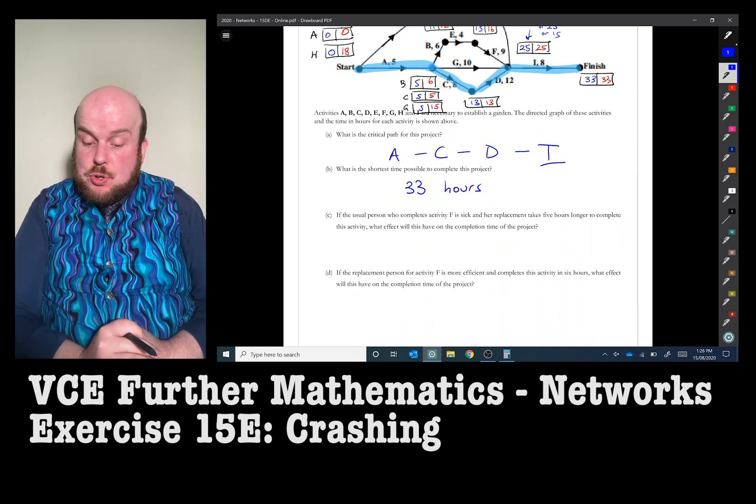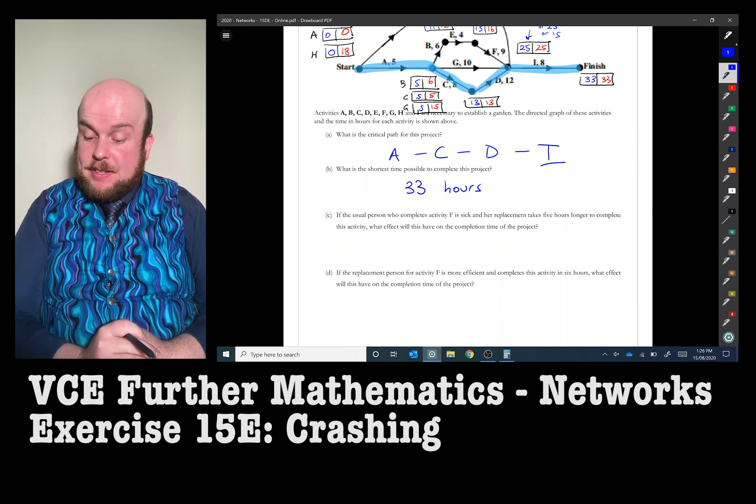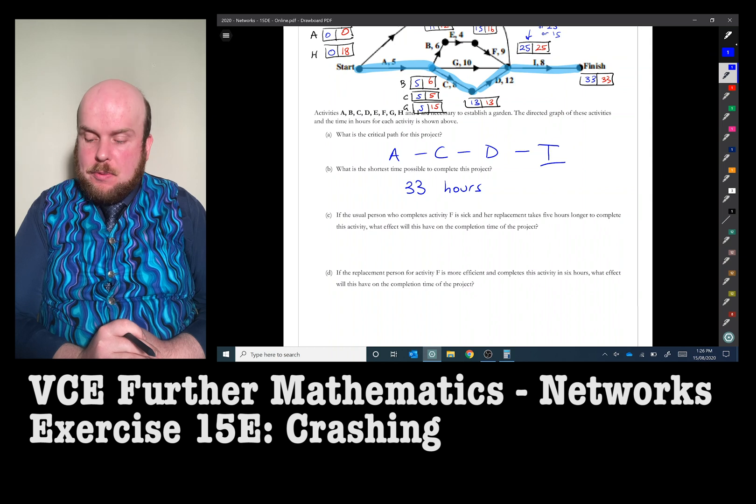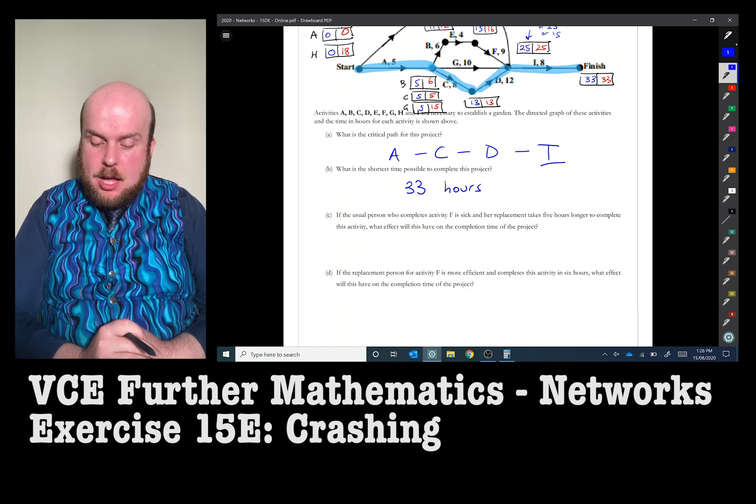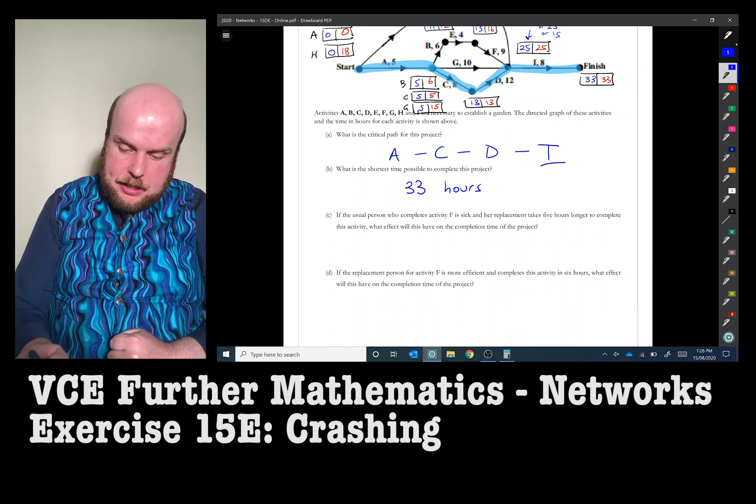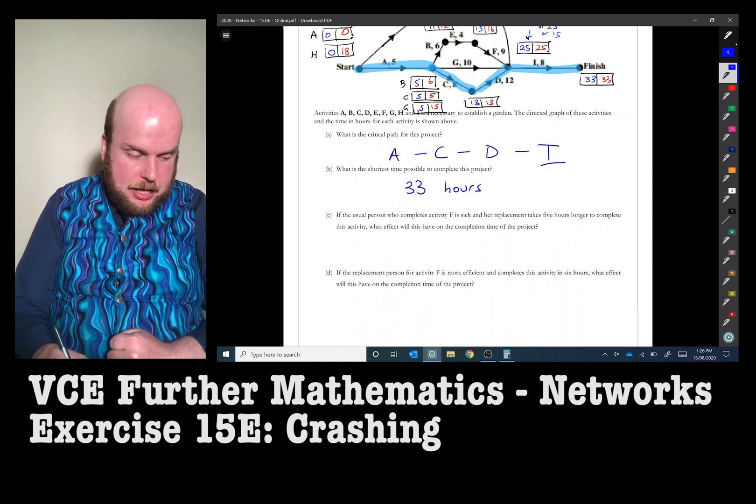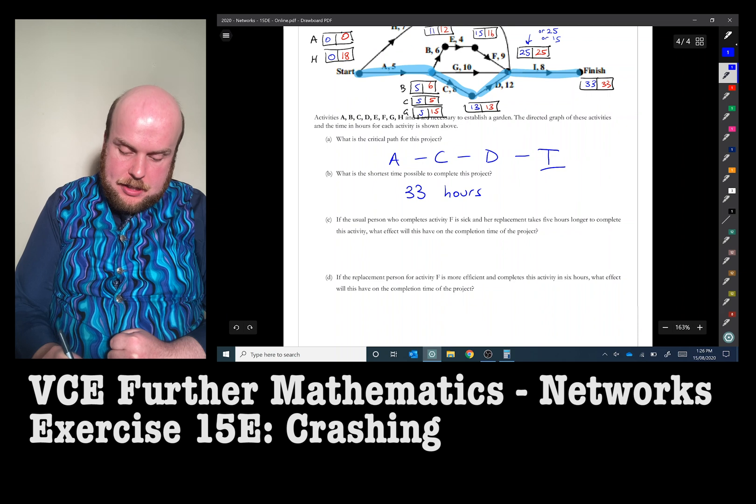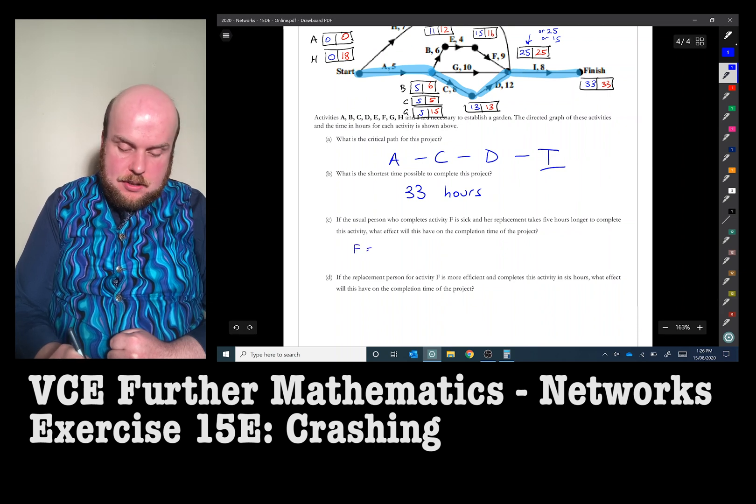Part C: If the usual person who completes activity F is sick and her replacement takes five hours longer to complete this activity, what effect will this have on the completion time of the project? Well, F is currently, as we can see, there's activity F. F is currently equal to nine. So therefore, the new F will be equal to nine plus five, which is 14.